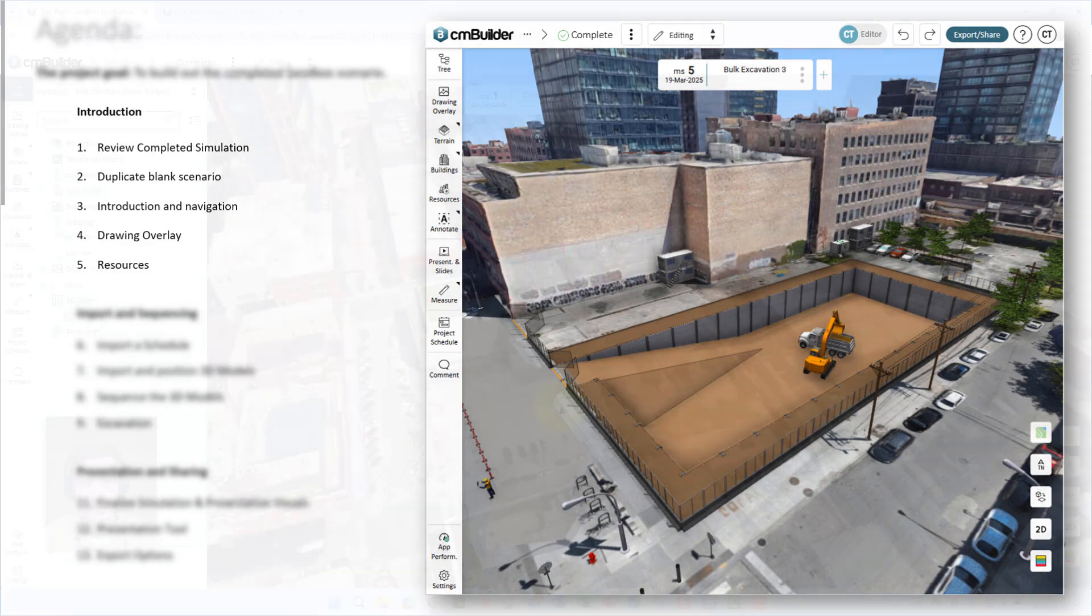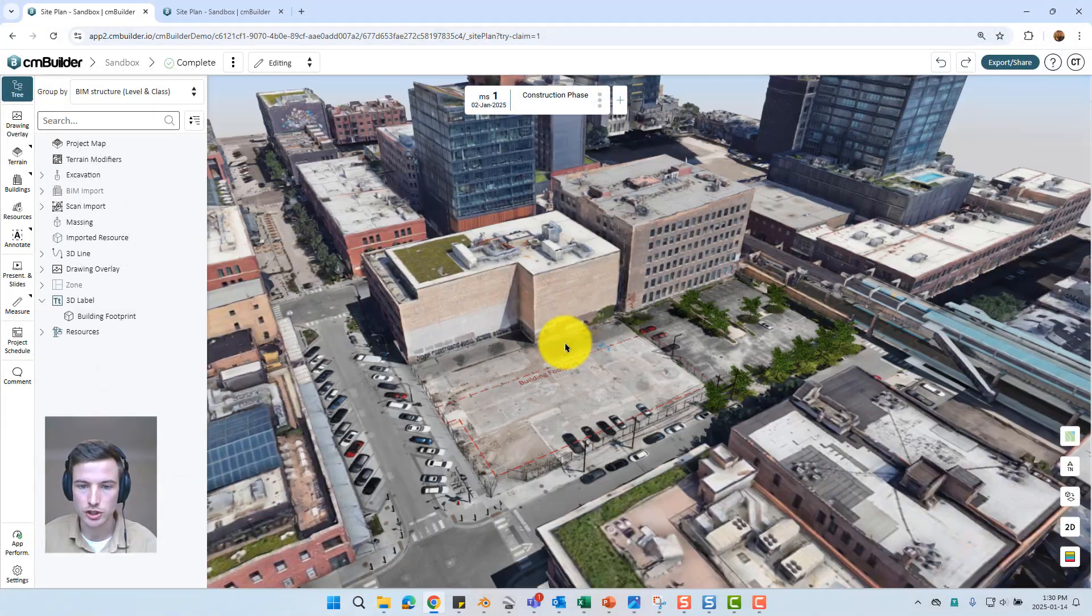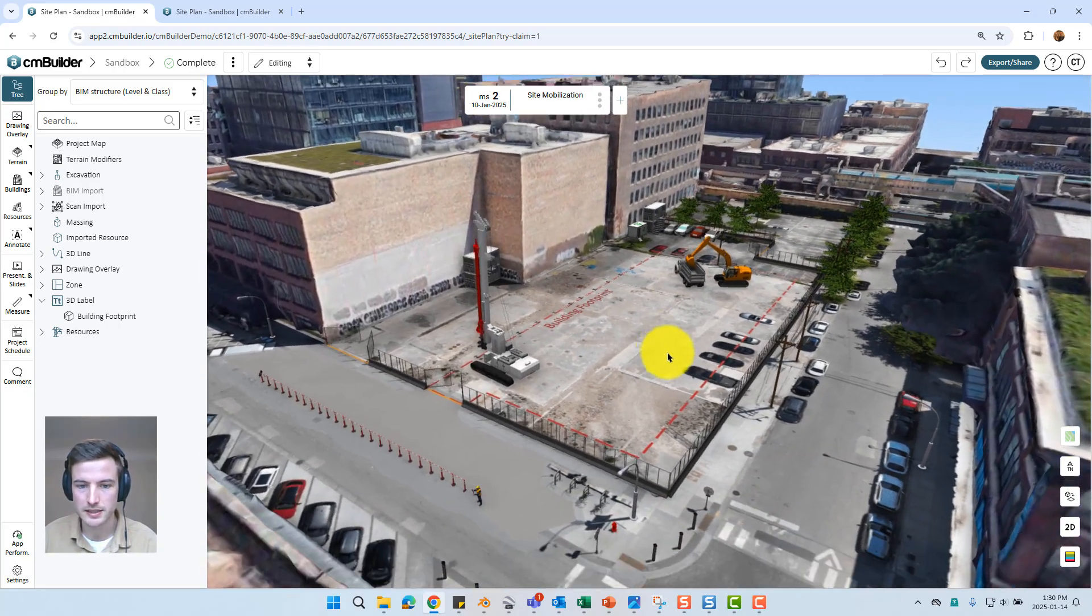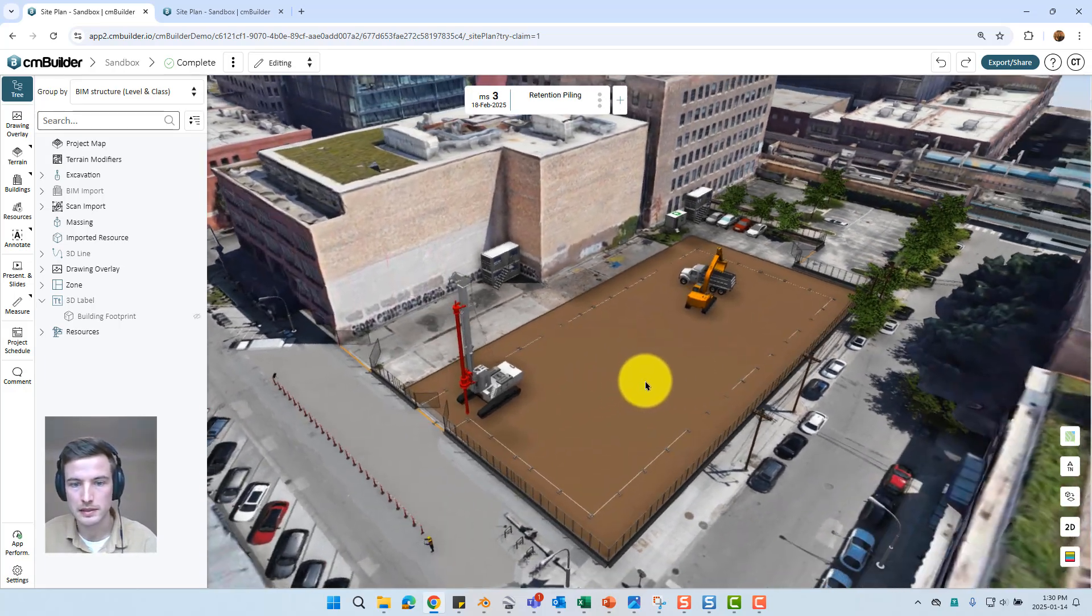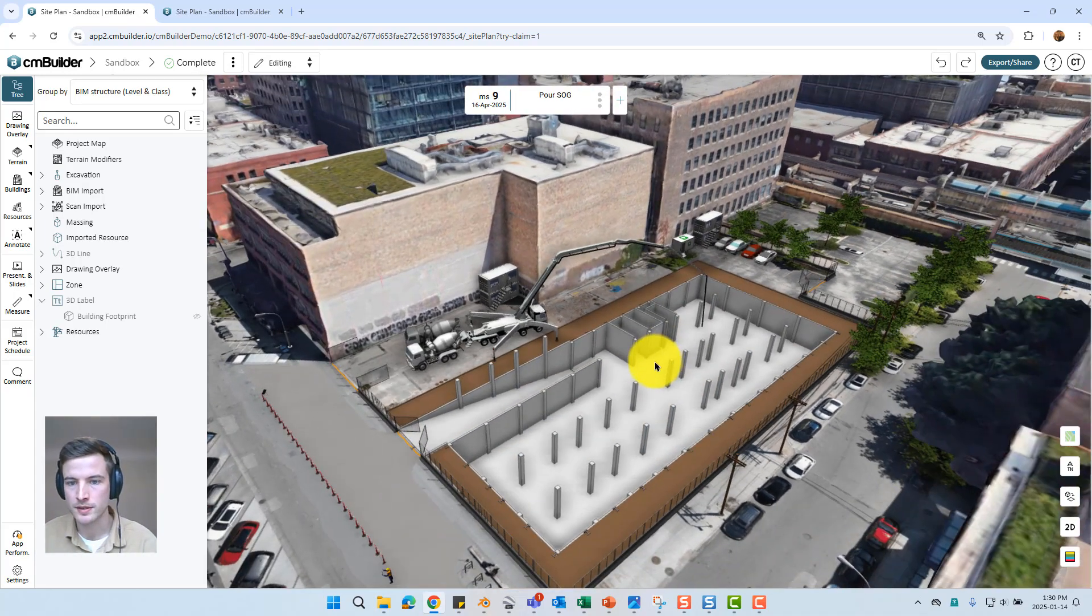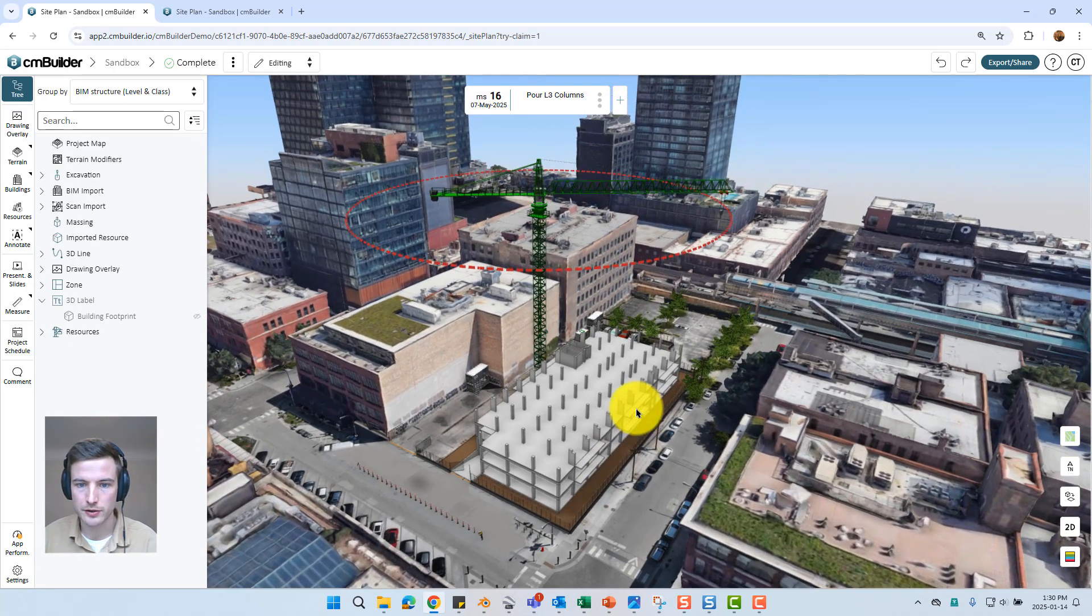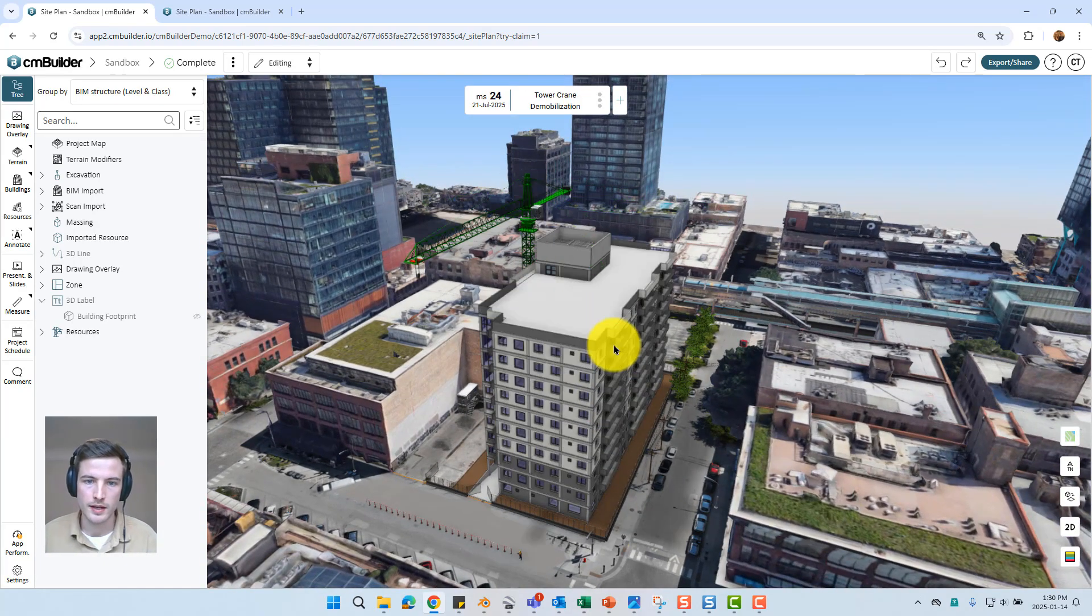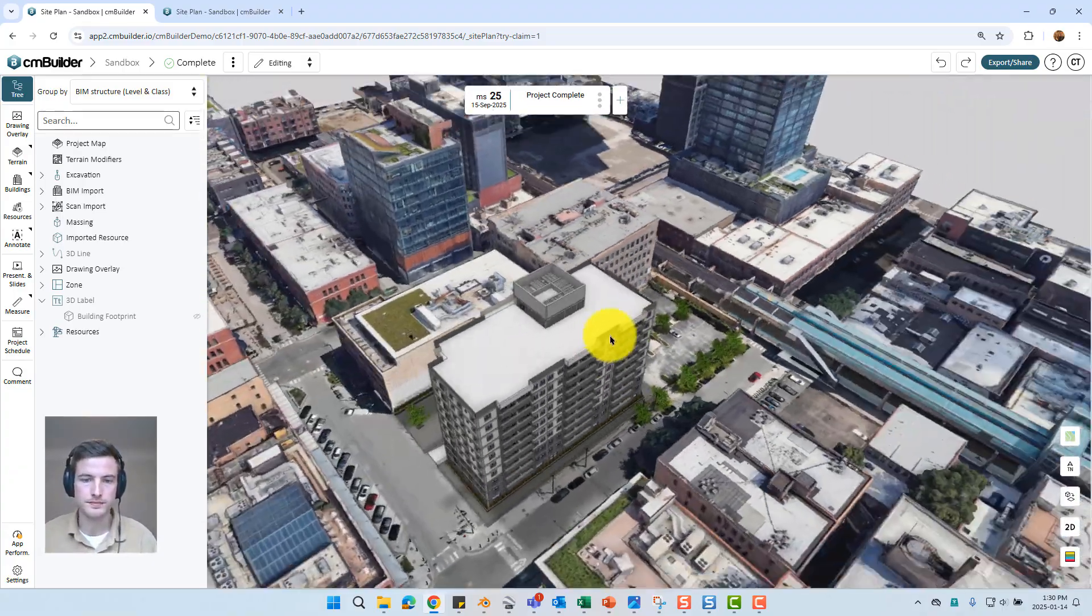So first things first we're going to dive into the completed simulation. We can see this is our site, it happens to be in Chicago. We can flip through these first couple milestones. I see we have a few resources brought into site, site vents, offices, all that good stuff. We have our clear site and retention piling, a couple phases of bulk excavation. We can get into our concrete pours and I'm just using the arrow keys right now to navigate between milestones. I have our tower crane mobilized and then we have our envelope and fantastic. That is the completed simulation so now we can dive into creating that from scratch.